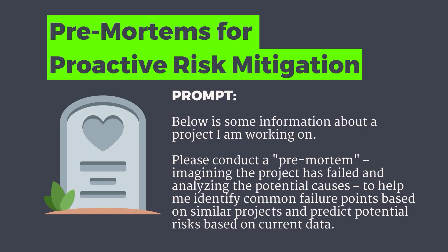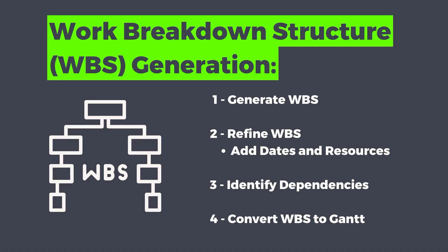There are a lot of ways to use large language models to create SMART goals and figure out the objectives of your projects, but I've found this prompt in particular can be a great starting place. This is my pre-mortem prompt. It says: below is some information about a project I'm working on — please conduct a pre-mortem, imagining the project has failed, analyzing potential causes to help identify common failure points and predict potential risks. Starting here helps you find the hardest parts of your project.